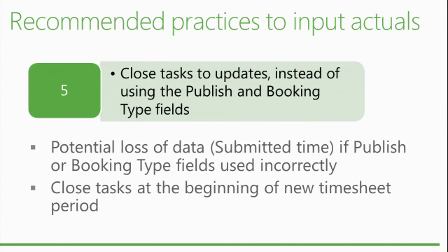What if you have sub-projects, multiple projects linking together? Does it treat it the same way, or does it treat them as separate projects? I think it's going to treat it the same way. That's the way, basically, each task or assignment is processed. So it's not going to matter, really. What's going to matter is what's happening at the level of each task assignment. If you have 200 assignments for each task and it's very long duration, each task will take some time to be processed. Yeah, that's what it is.